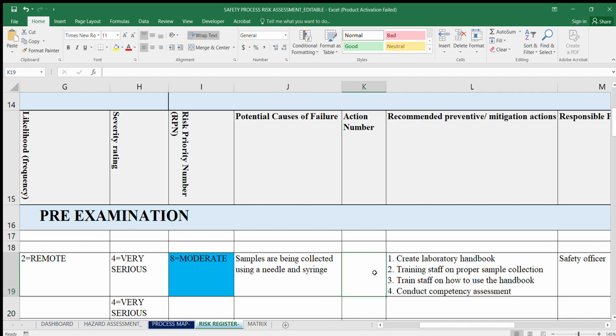But if you've done your preventive action and you've proposed preventive actions, you're supposed to put these preventive actions on your preventive action log. So the log will have sequential preventive actions. So this potential action will come from your root cause analysis. Maybe this potential cause will be 009, which is number 9 on your action log.